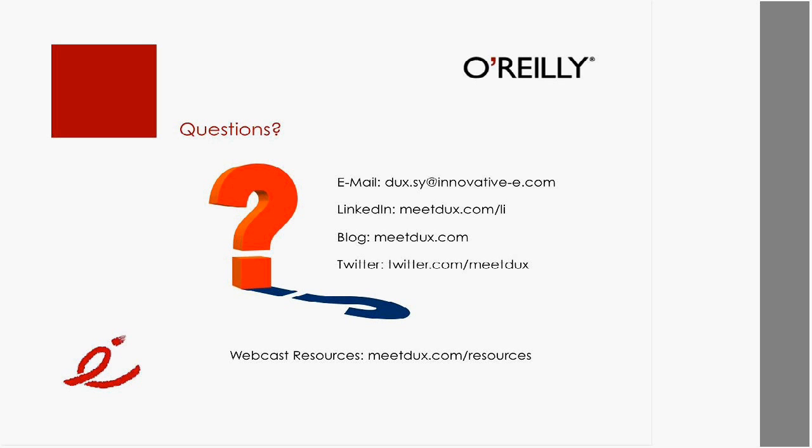There's one more. Any advice on using SharePoint to do resource availability management? There are various ways of doing this. Out of the box, there's nothing built in for resource availability, but you can create a custom list, create a resource list, and then do cross-list references. Or you can get a great tool.